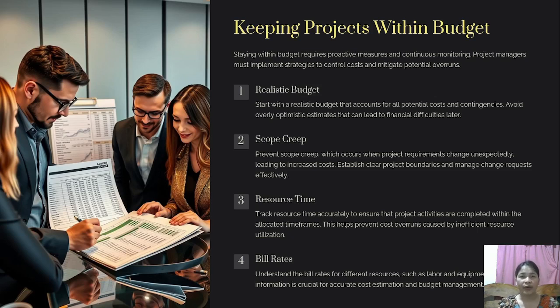Second is to avoid scope creep. Scope creep actually occurs when project requirements change unexpectedly, leading to increased cost. This occurs especially if there is a change in the management. So we have to avoid scope creep, establish clear project boundaries, and manage change requests effectively.